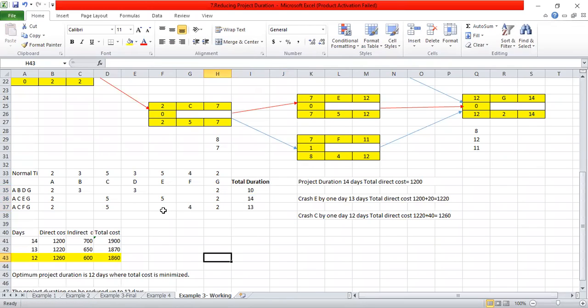Right. So by seeing these 3 paths, the path which has the highest duration becomes the critical path as well. So Rukshika is telling that it is 40 duration, right? So the 40 duration is the highest or the longest path. So that means this path now becomes the critical path.